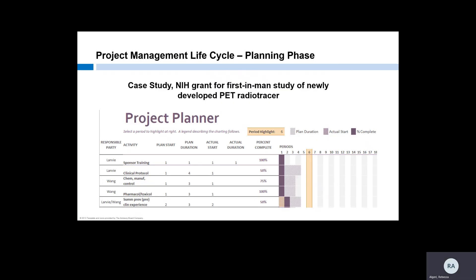The easiest and most transparent way to manage tasks and accountability is by putting it out there in a document that the whole team can see. This is an example from the case study introduced in Module 1. During the planning phase, the project manager laid out all of the deliverables necessary to achieve the study startup milestone. At the team's first meeting after kickoff, this project plan was discussed and agreed upon. Responsible parties for each deliverable were assigned, and the anticipated amount of time to complete was recorded. At subsequent meetings, status was reviewed and necessary adjustments were made. In this example, the team decided that one period equals one week. This project plan functions like a Gantt chart, making the timelines for deliverables and meeting the milestone apparent at a glance.